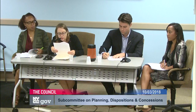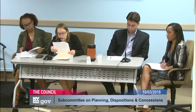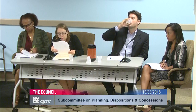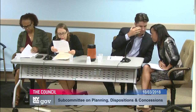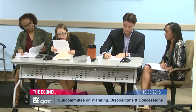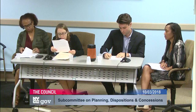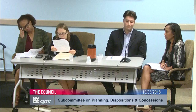The unit breakdown across the portfolio includes 4 superintendent units as well as 17 studios, 159 one-bedroom, 197 two-bedroom, and 35 three-bedroom apartments with no vacancies. Household AMIs at initial occupancy are capped at 50% AMI as per the HAP contract, and tenants pay 30% of adjusted gross household income. The buildings will undergo a moderate rehab, including new kitchens and baths, low-flow fixtures, energy-efficient lighting, in-unit electrical panels, new closet doors, and custom shelving. There will be upgrades to common areas and the community room, as well as roof, boiler, and window replacements.